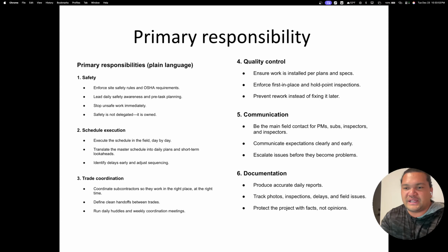So, what's your 3 day look ahead? What is your next week look ahead? We're not looking at the whole 3 months, a whole month. We're just looking at your dailies, what should be done today. If it's not being done, what is wrong and how can we correct it? Do we need to call the owner of the subcontractor that's not there and say, hey, we need to get this done? We need your guys here. Do we need to incentivize or something? We need to figure that out. As a superintendent, that is your job.